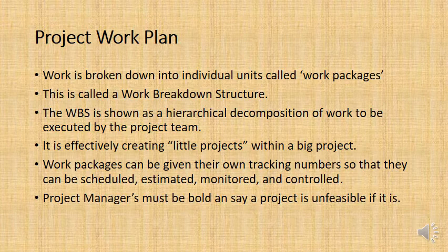So we know that the design of the foundation can only come after the design of the superstructure. So we know how much weight is in the superstructure, so we know what load is going on the foundation.